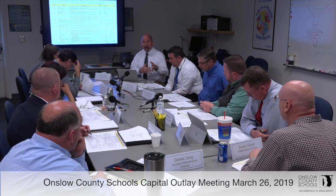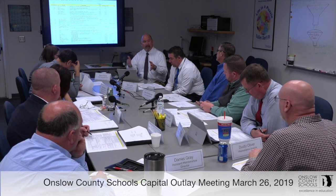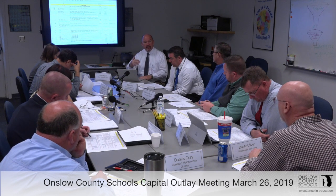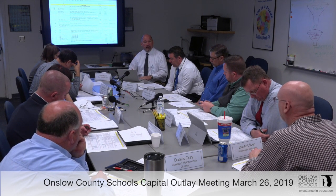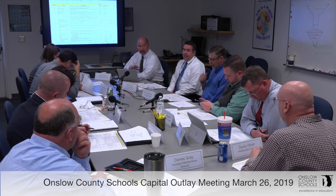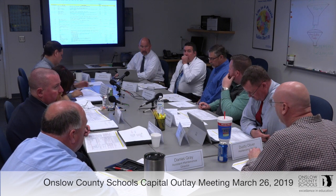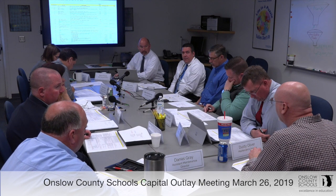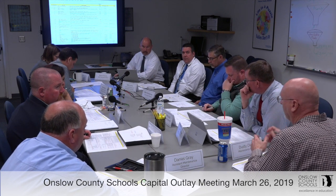It's got to be replaced right away. Or maybe a 20-year-old roof looks like it's got another 5 or 6 years of life in it, so we'll put that farther down the road. So it's not just the age of the roof, it's the physical characteristics of the roof too that we look at. Is that right? Yes, sir. We look at our work orders. We've done some infrared scanning on a lot of our roofs to see if we could make some good repairs intelligently. So it's a big process.